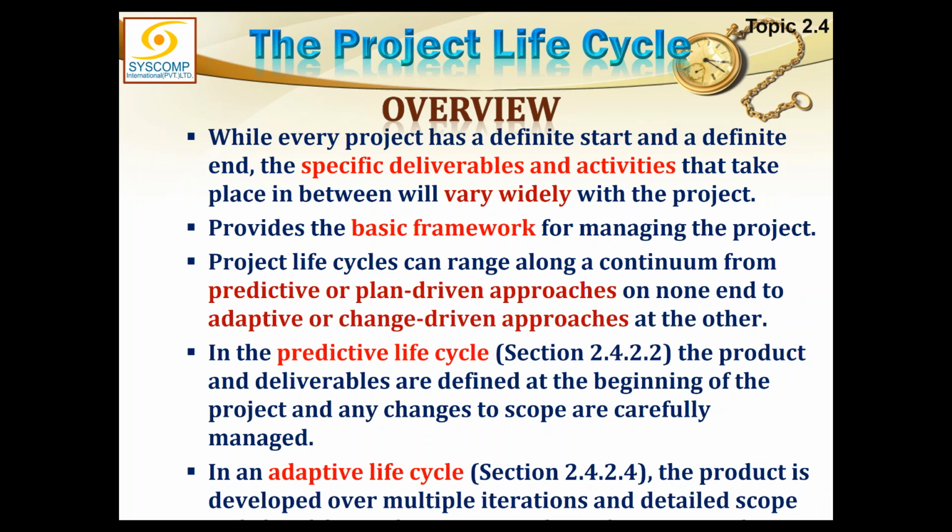Every phase should be self-contained in itself, and it should produce some output, some deliverable, and only after a phase has delivered its deliverable can we allow the project to move into the next phase.